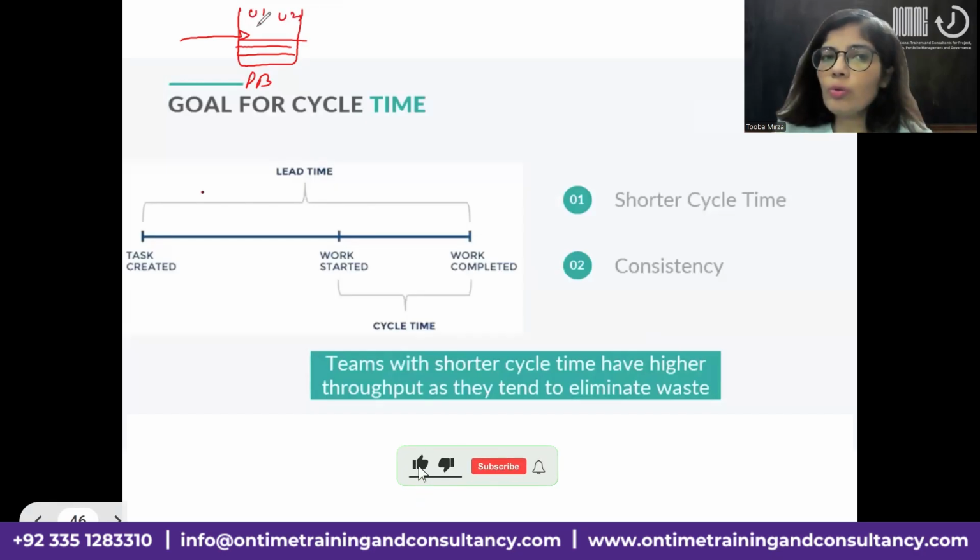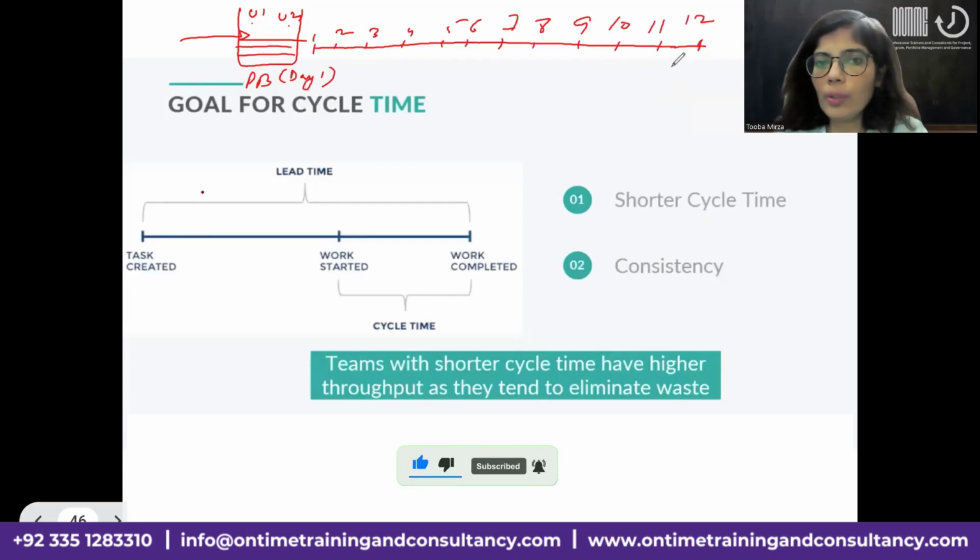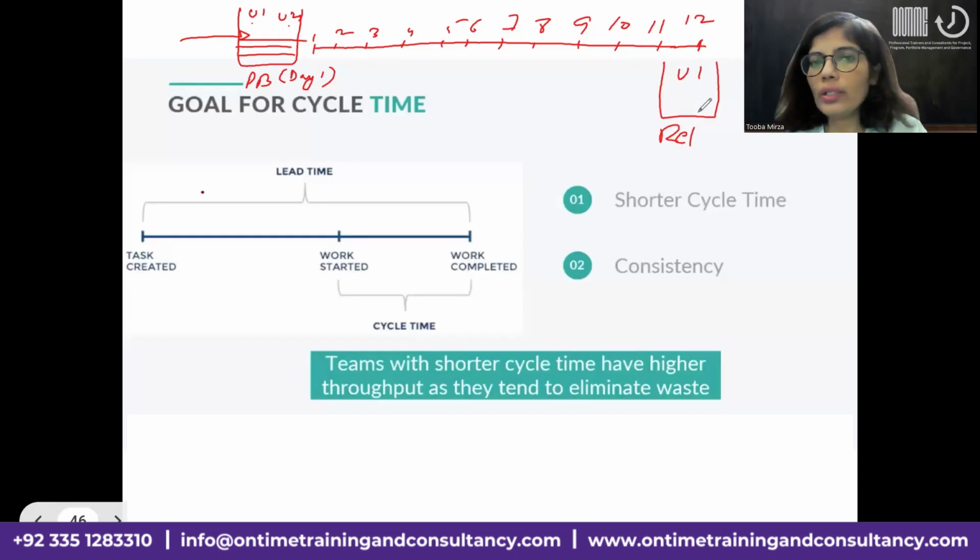And customer also has provided these user story 1 and 2 as a priority, right? That this should be prioritized in the upcoming release. You have a timeline. For instance, this user story 1 and 2 has been accepted on the day 1. So when this happened, it was the day 1 of that time. So this is a release that we are talking about. So although you have a whole backlog, this release is actually going to be delivering these 2 user stories together. Let's just make it up because, of course, in the practical world, the releases are way more extensive.